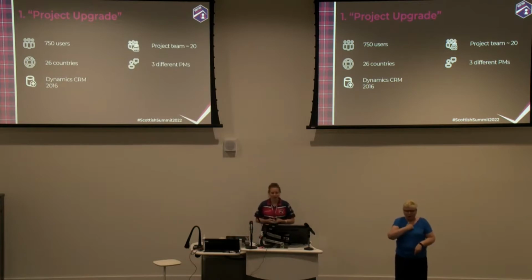You go in one direction for 1 month, a second direction the next month, and then in the end, after 6 months, you have actually not moved on with your project because you have taken so many different directions. Everyone's frustrated, and then you need to basically start over again. So you need the person or persons, depending on the company, who are not biased, but independent. They don't have 2 sides. They're just there to take the decision or make sure that the decisions are made.